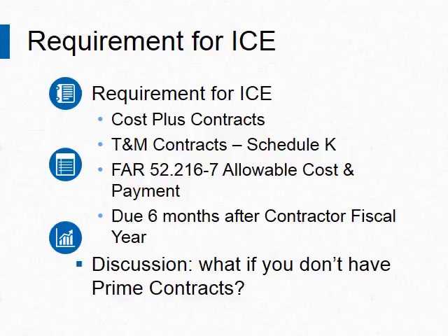They will do a review they'll call an adequacy review. They're going to open your package, take a look at it, see if it looks like most of the schedules are complete. If they aren't, they'll write you back a letter that says, well, you need to re-prepare. This is what we saw to be missing. This is the things that we question. But you do need to complete it on time, even if you don't think you have it all right.